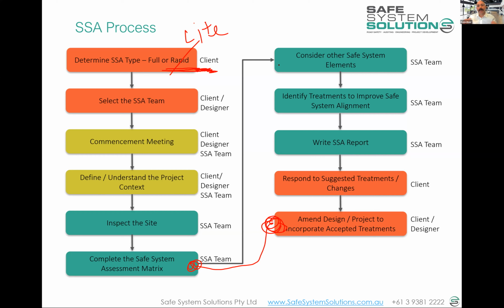But it is essentially about the same as a road safety audit, really. Maybe a tiny bit longer, but generally once you've got your template set up and everything like that, it's about the same as a road safety audit. So for an intersection with one design option at a conceptual level, at most a functional design, I'd be talking 2 or 3 days work, maybe 2 days of actual hard work and a bit of sniffing around the site.